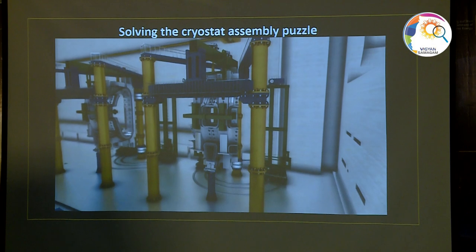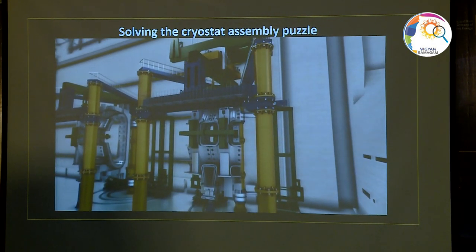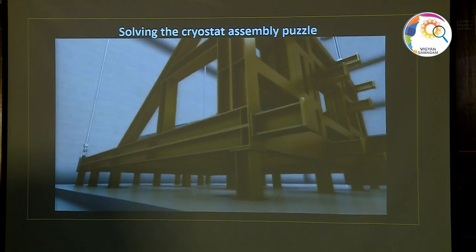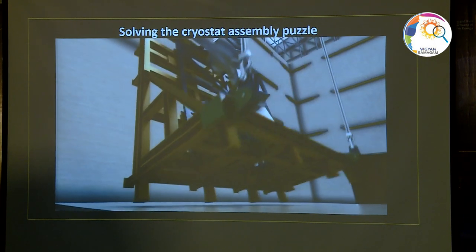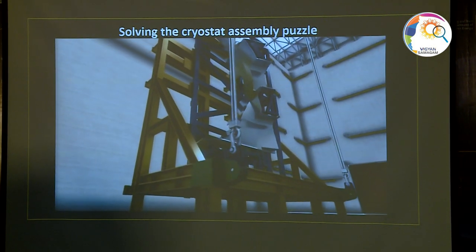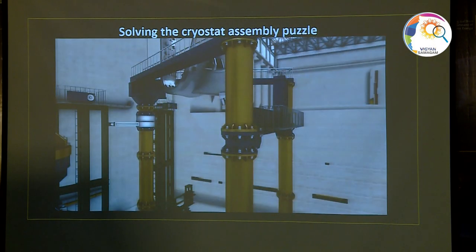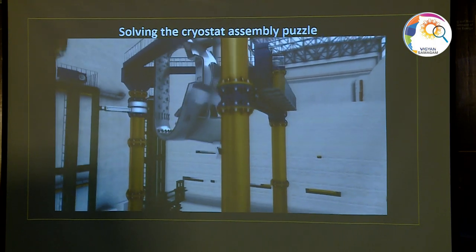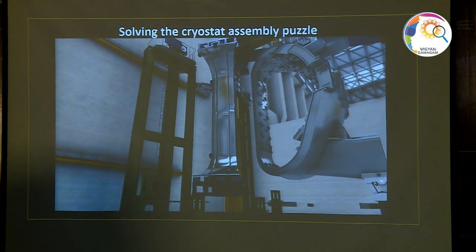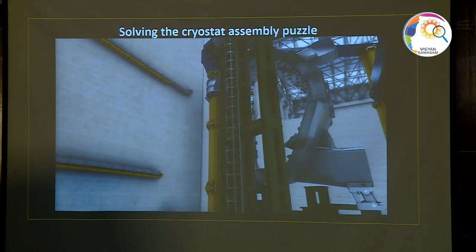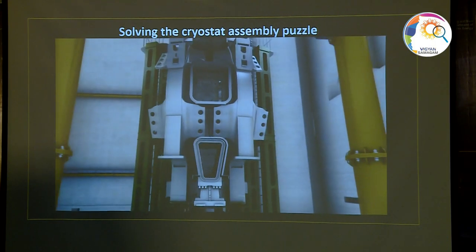Each set made up of a vacuum vessel sector, the surrounding thermal shields, and 2 toroidal field coils. In order to successfully maneuver hundreds of very large tokamak components into position, a very precise made-to-order set of tools is currently under construction. A special sub-assembly tool will suspend each of the 9 sectors of the vacuum vessel from its top, install associated thermal shielding, and rotate 2 toroidal field coils into position.